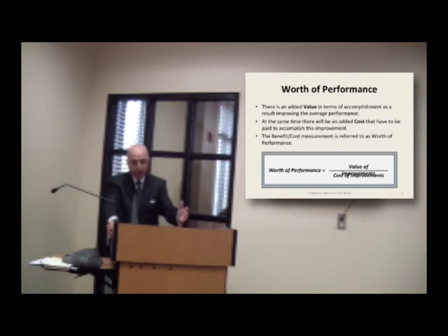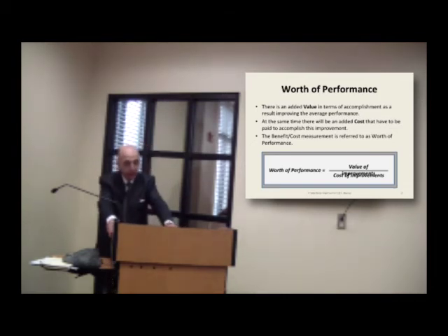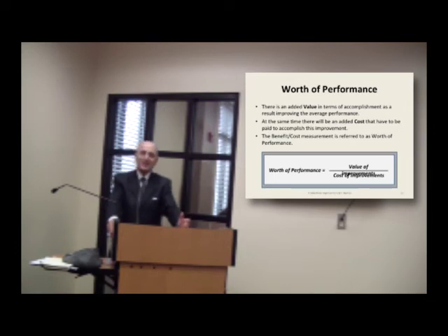At the same time, there will be an added cost that has to be paid to accomplish this improvement. The benefit cost measurement is referred to as the worth of performance. So you have to decide, is it worth the money?